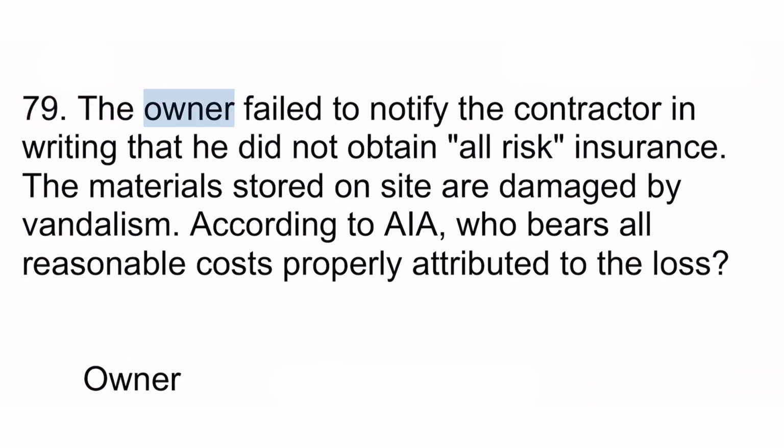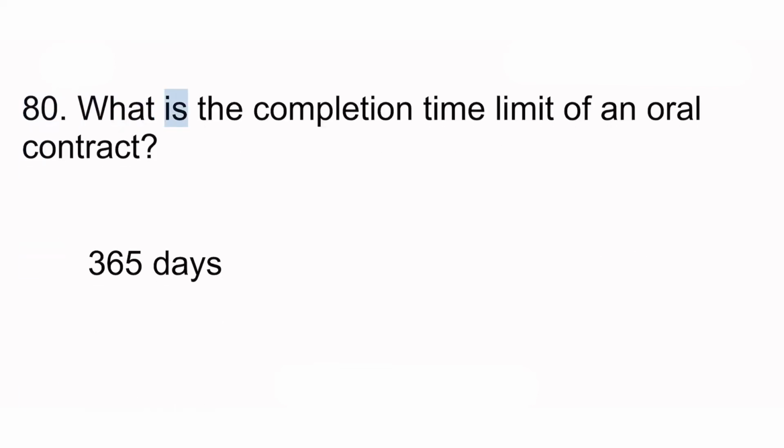79. The owner failed to notify the contractor in writing that he did not obtain all risk insurance. The materials stored on site are damaged by vandalism. According to AIA, who bears all reasonable costs properly attributed to the loss? Owner. 80. What is the completion time limit of an oral contract? 365 days.